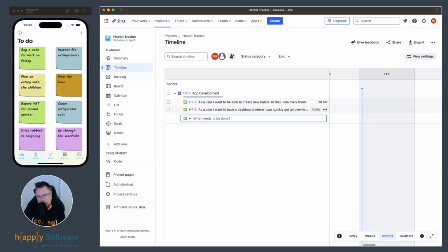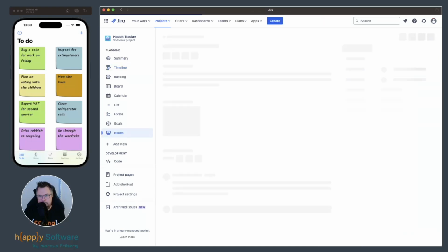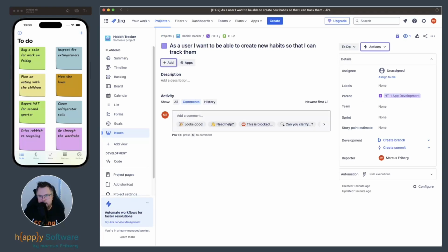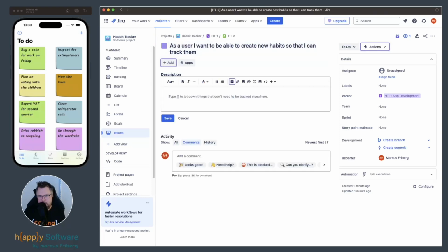Later on, I may break them down even more into smaller parts, because you should be able to complete one of these stories within a week or two, depending on how long your sprint time is. But I try to start at least a little bit refined. You can also open this link. This is the story text, the title, and I used to describe it a bit further.